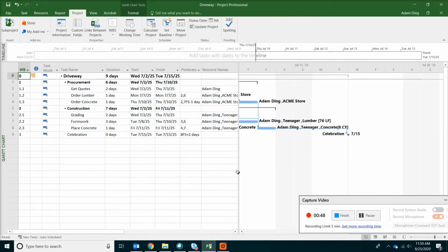The next thing we need to do is put in a date indicating when the update was done. On the top, find NA beside Status Date, click on that and then put in the actual date. In our case, it's July 9 of 25, indicating the year 2025.